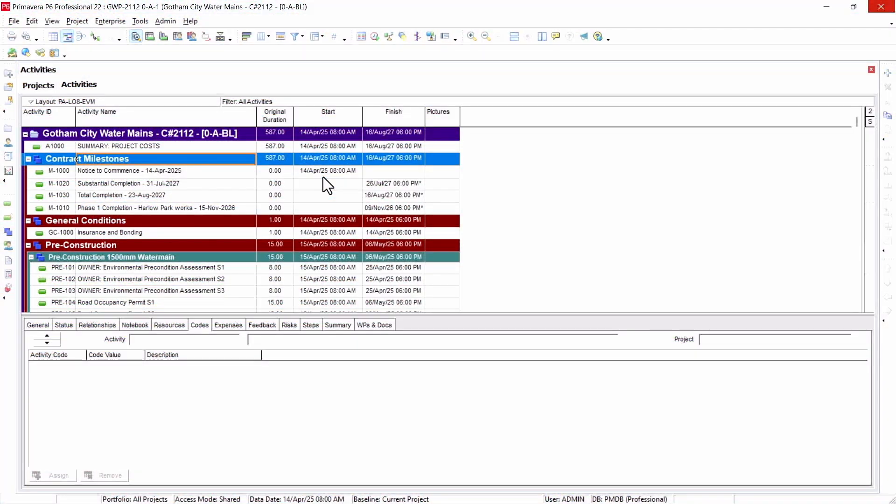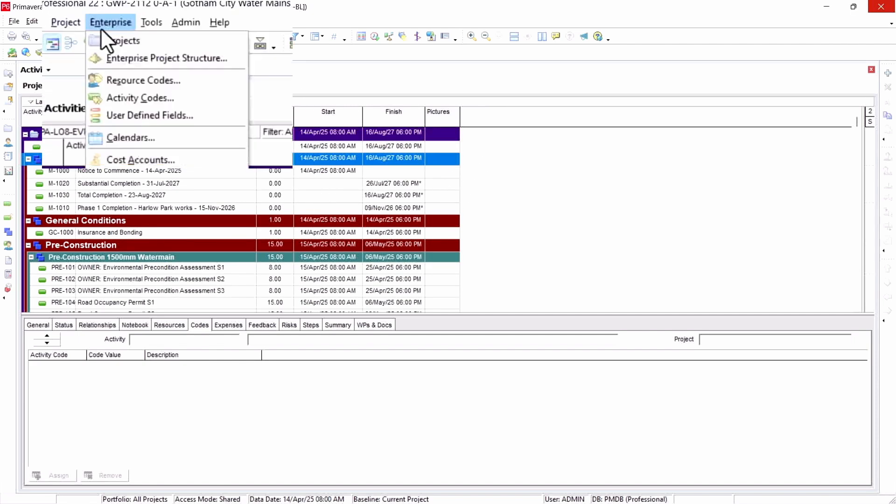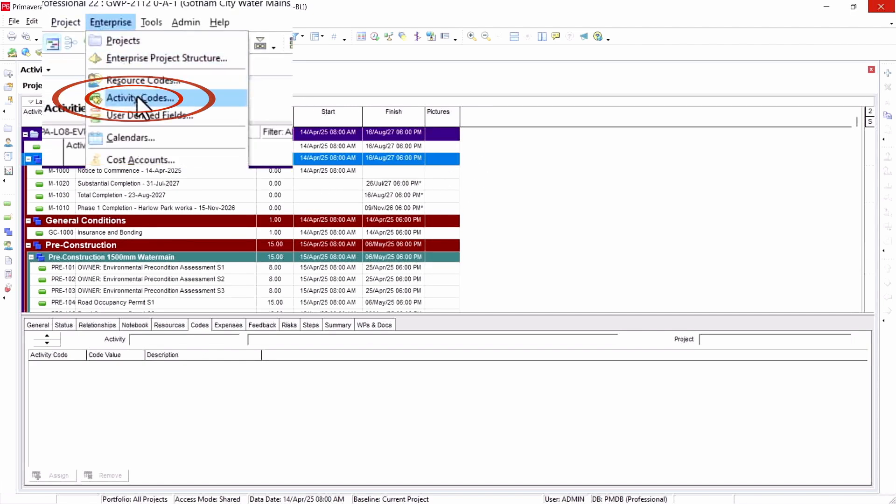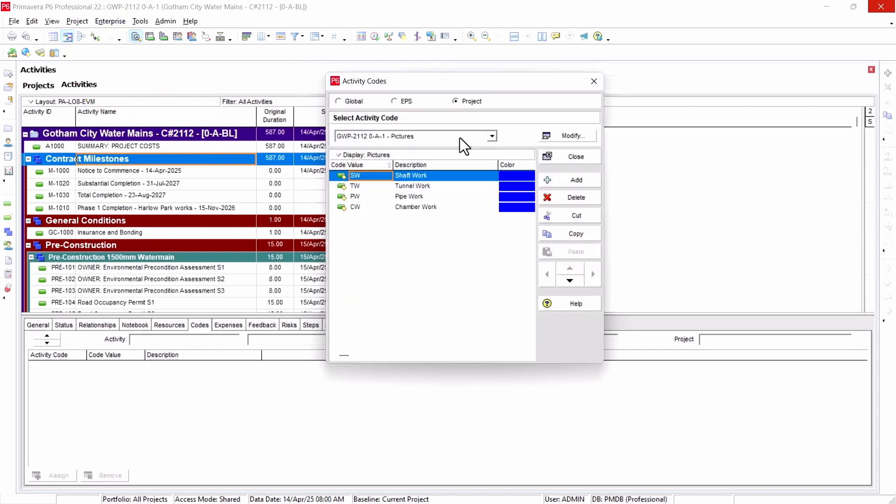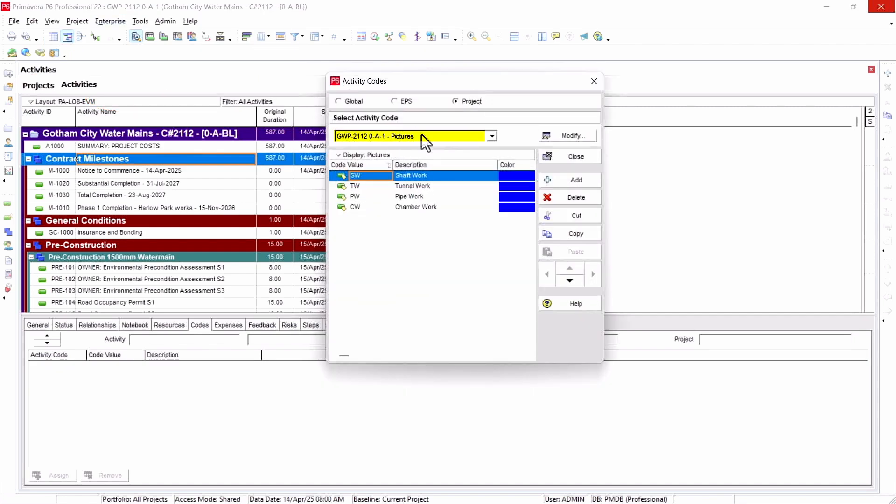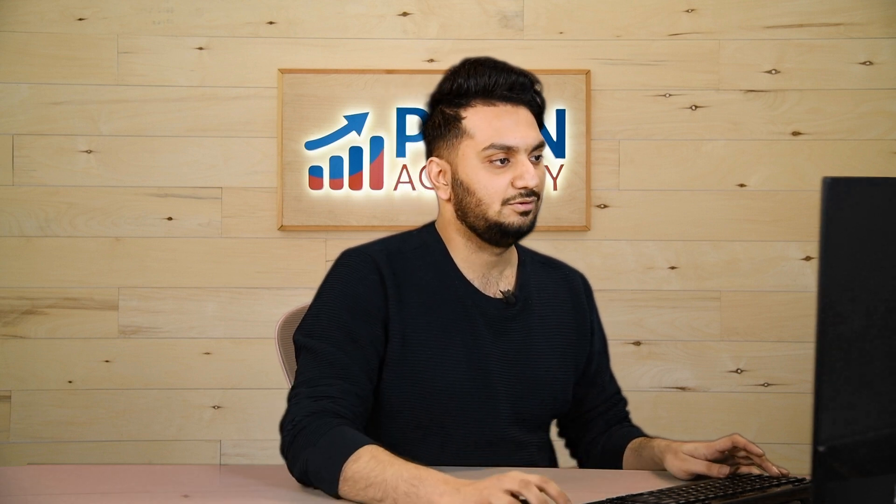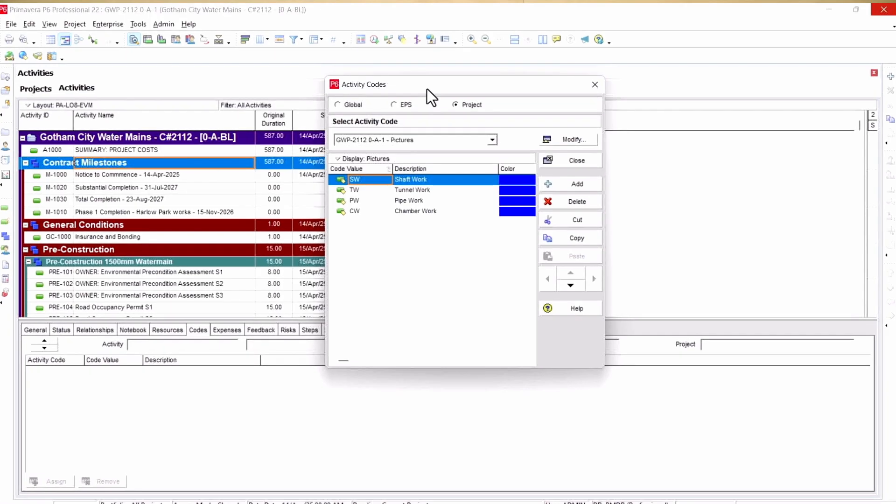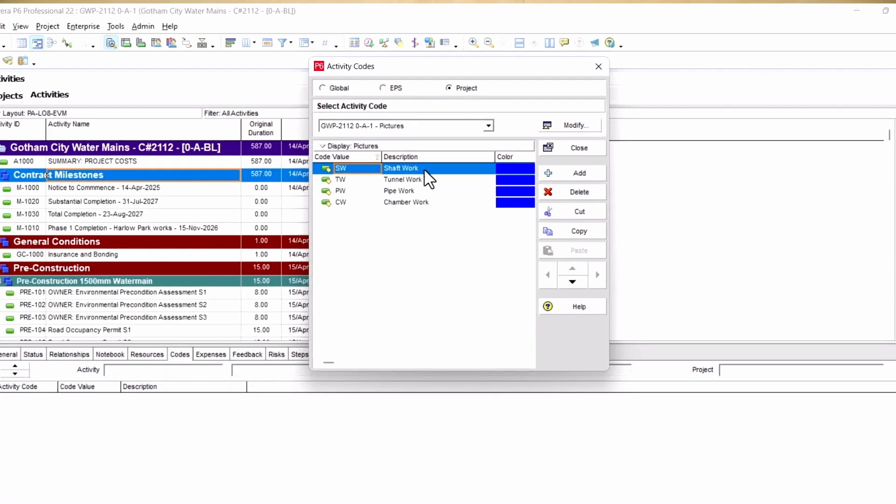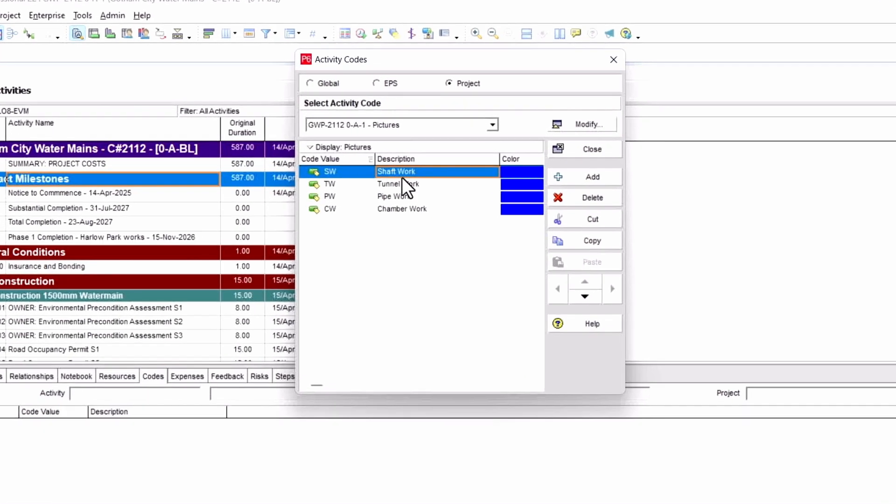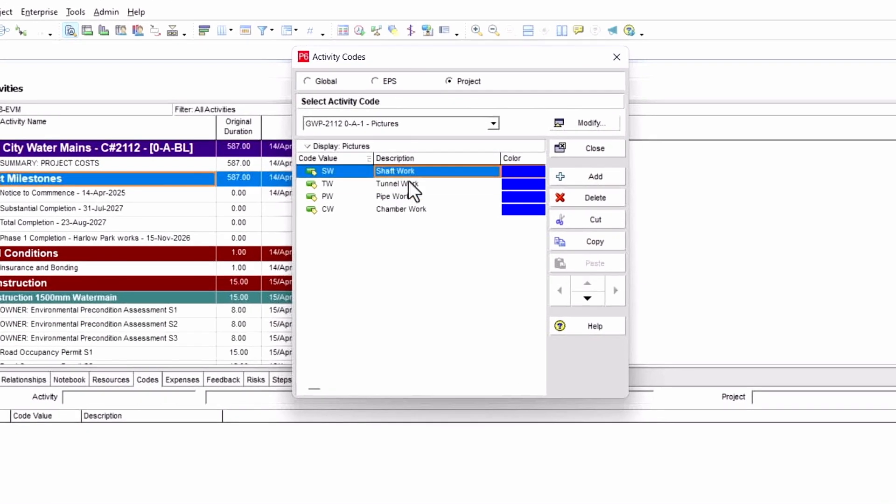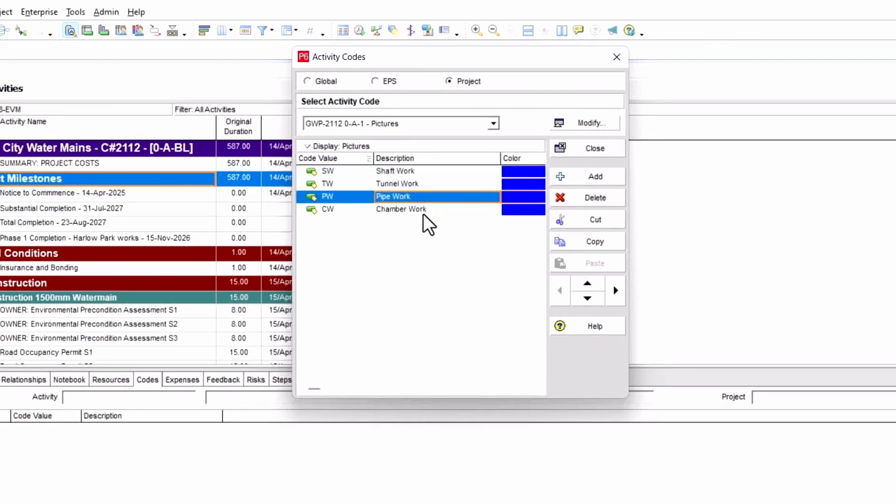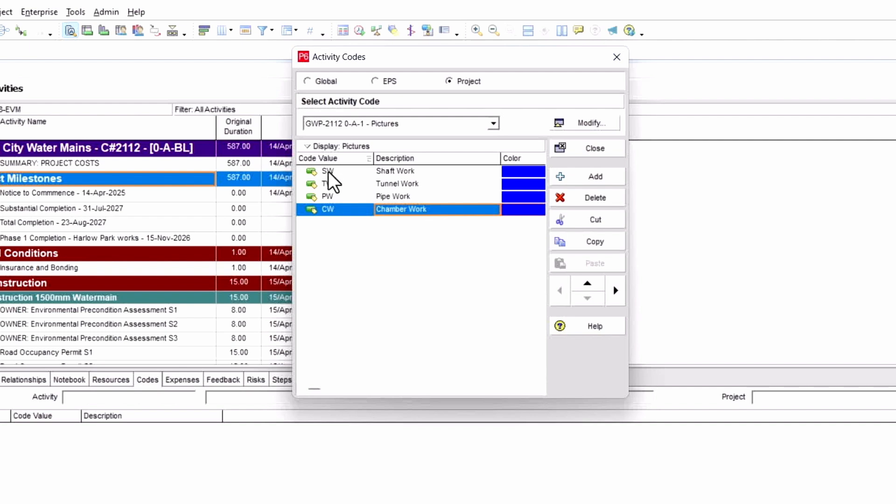Here you can see we have a Gotham City water main project where I have assigned an activity code. To see that, you can go under activity codes, and under project, I have defined an activity code called pictures. This is just as an identifier for my Power BI later to link it to our schedule. You can see here I have identified it by shaft work, tunnel work, pipe work, and chamber work.